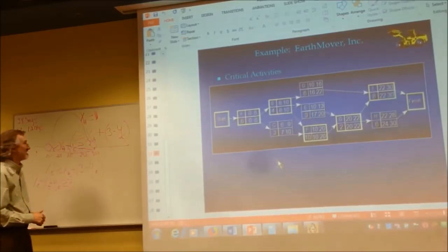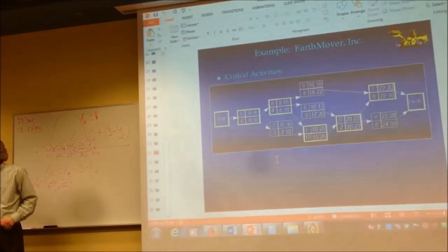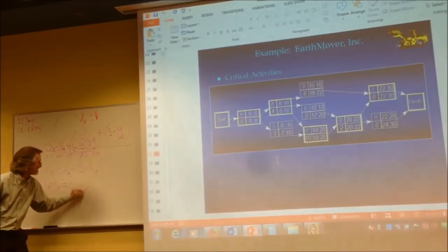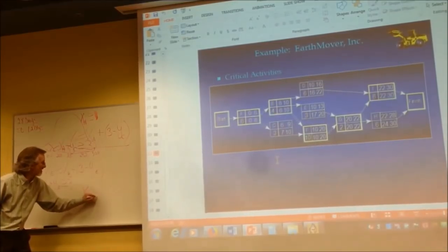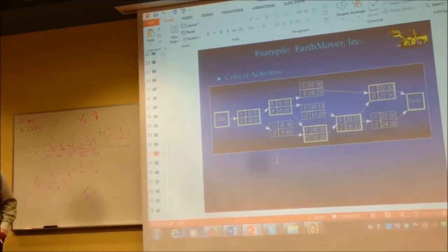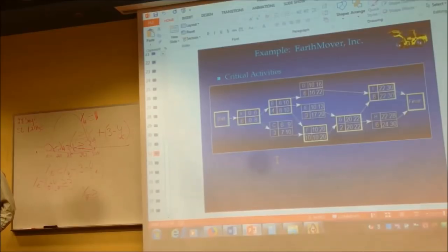All right, help me out. Let's do another one. One more. Here we go. You ready? We're going to do F. X sub F greater than or equal to, what precedes F? C and B. Both. That's right.